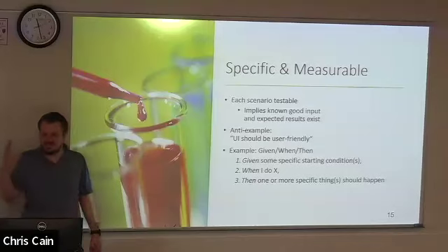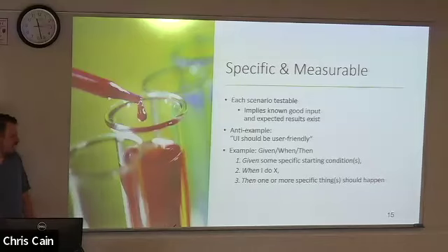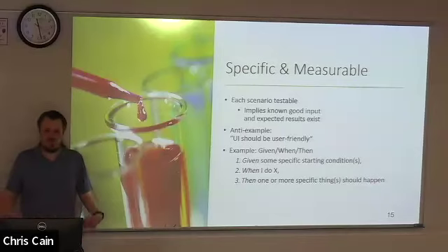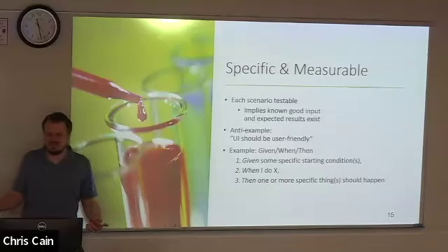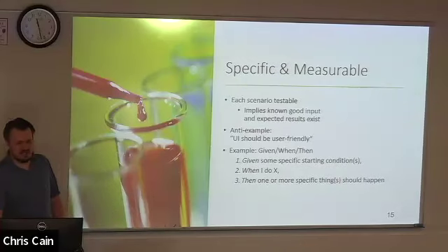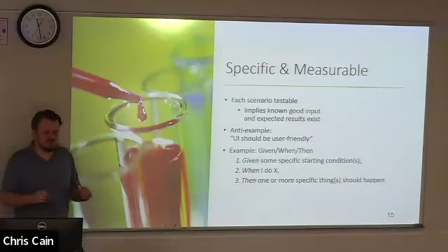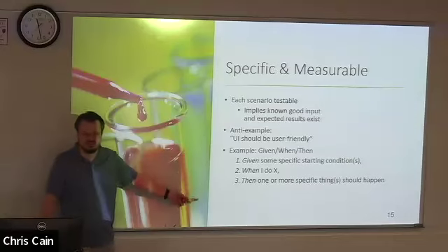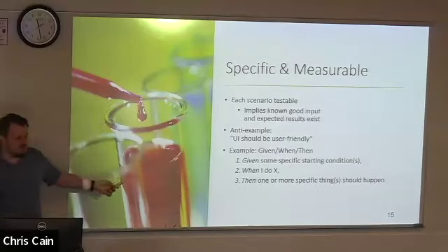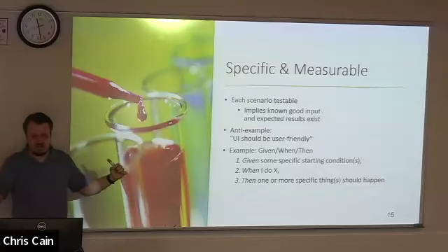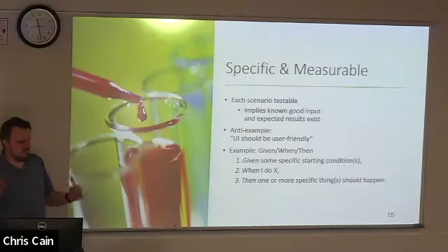So it's very still user-centered. We don't have any technology associated with how we are going to accomplish this, but now we have ways of interacting with an application that hasn't been created yet. So these are your scenarios. Once you are done writing your user stories, you're going to start mapping those user stories into one or more scenarios. Once you have those scenarios, those should be one-to-one mappings with tasks, something that needs to be accomplished.